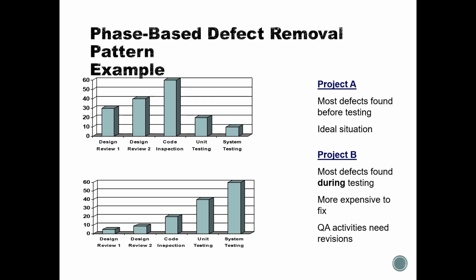If we found most problems during the design or code inspection or during the actual testing work, or somewhere else, which meant that when we went to technical testing, doing the actual quality assurance work, we found only a couple of problems, it means that our design planning work, this project or this process works because it's capable of weeding out most of the problems.